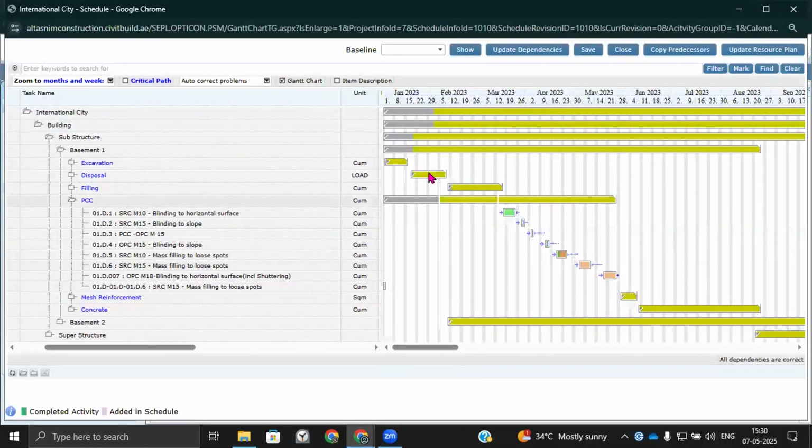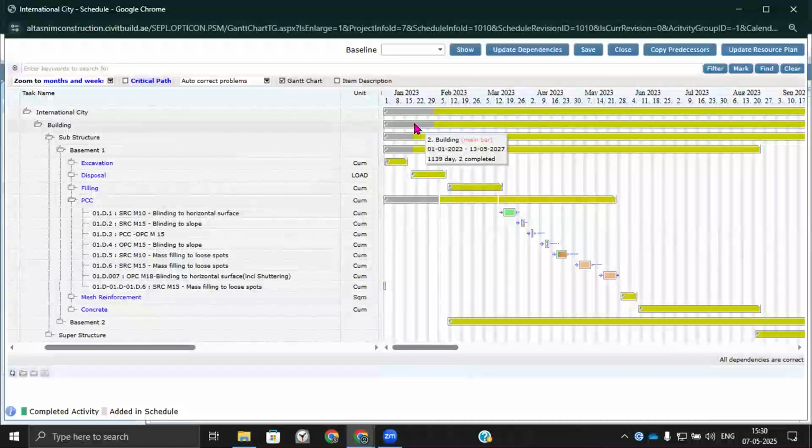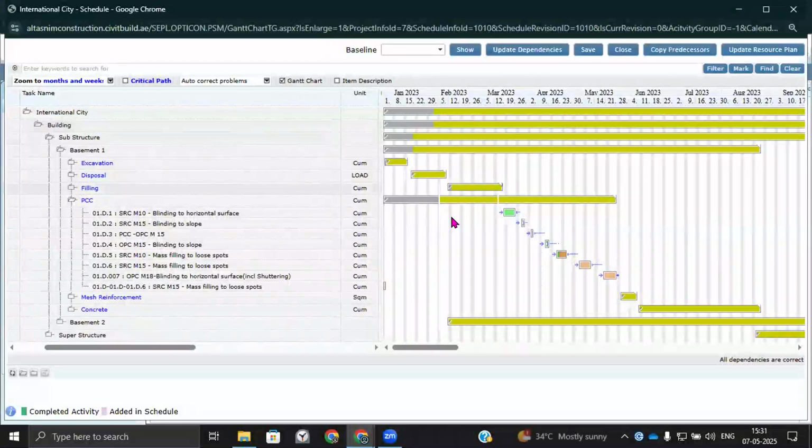If you notice, there is a color difference here, which is nothing but the real-time project progress. Since it is an integrated platform, the system is dependent on the daily field report, which I will brief you about, and is tightly integrated with it. So whatever the site team is filling in for project progress, quantities, and overall execution updates, the Gantt chart gets updated in real time.